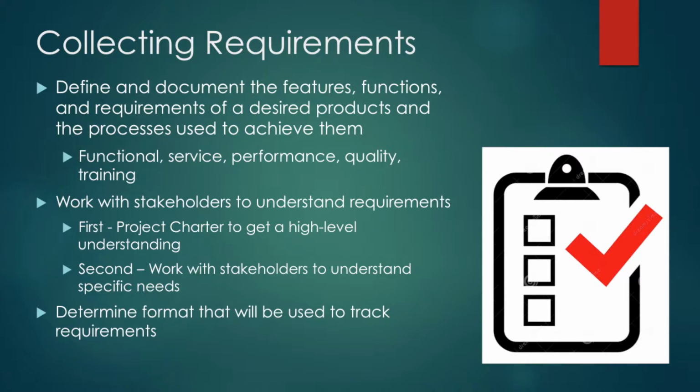Collecting requirements is a second process in Project Scope Management, and often the most difficult for project managers. This is when a project team works with stakeholders to understand and document the requirements of a project. First, by reviewing the project charter to gain a general overview of what the project demands, and second, by working with all the stakeholders to get a more ground-level understanding. Putting in the time and effort to determine a project's requirements can help a project run more smoothly down the road.